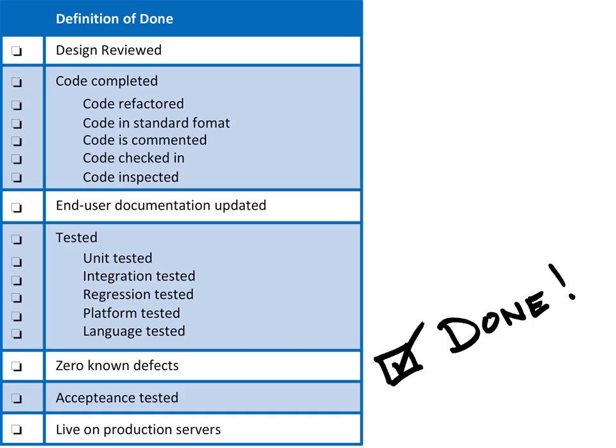So if you have a story which is 3 points and it's the end of the sprint, and you are not done with the whole thing even though you have put in enough hours, the best way to go about it is to consider it 0, and once you finish it in the next sprint, that can be counted as a complete 3. Even though some part of the work was done in the first sprint but was not measured, the subsequent sprint will catch up on it, and on average that would give a better computation of velocity and more predictable results.